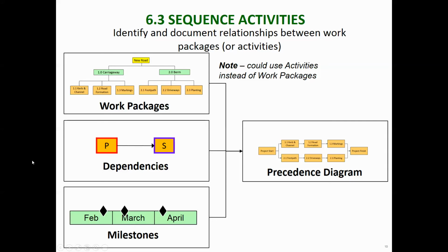So remember, activities are where you take these and break them up. You take a work package and break it down into, say, construct foundation, compact foundation, all those sort of things. As I said before, usually with medium-sized engineering construction projects, we just work at work package level. So the inputs are the work packages, or activities, depending on which way you're doing it. You could have a mix.